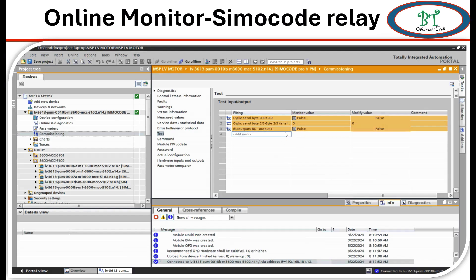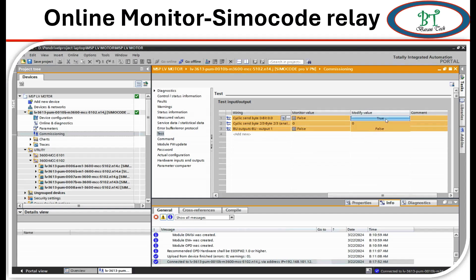Now I have added the signals. Now I am going to simulate the signal. First, I am going to change the cyclic bit 0 from false to true. When you force the modify value from false to true, we can see the monitoring value is changing. During this time, we can see the simulation value on DCS.